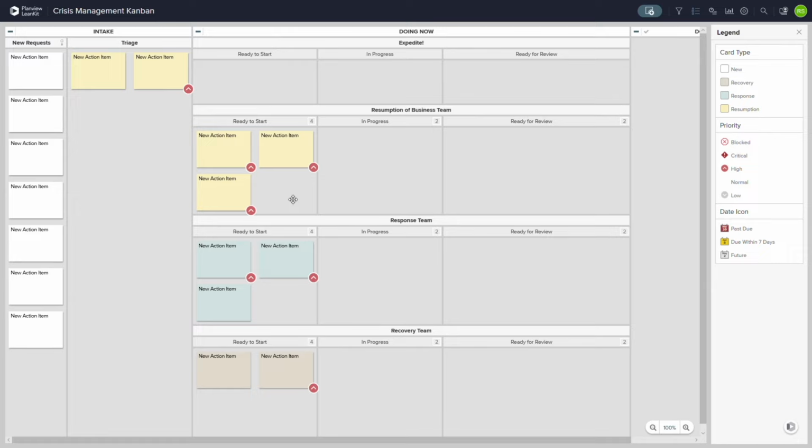So next we're going to talk about Kanban and the fact that Kanban is a pull system and not a push system. Right. So what exactly does that mean? In Kanban, we will often create a little bit of an artificial queue so that we limit the amount of work that any team can start working on, so that the focus is not on how much they start, but the focus is on actually getting those items done as rapidly as possible so that they can go and pull the next item in. So here we have some limits set up on our board.